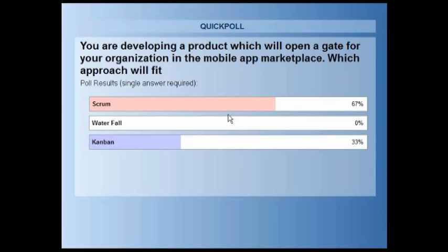See, both are agile, but Kanban is suitable for things where you need to deliver small packets, and every packet is a usable component for the end user. So if you have a running thing, if you have a base system ready and you are adding features on it, you may follow Kanban, because as you add a feature, the customer will start using it.